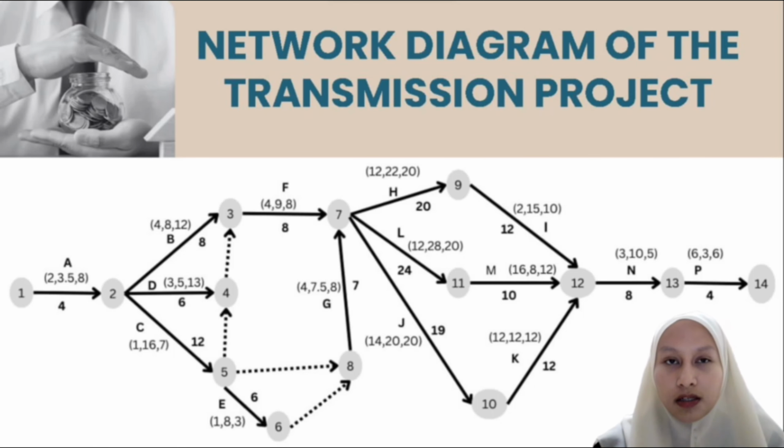The next is arrows, which show the relationships and interdependencies between nodes. They indicate the sequence in which activities must be completed. So by arranging and connecting different components, the graphic shows the event progressions and the critical path that controls the project duration. From here, the critical path is the sequence of nodes and arrows that represent the longest path through the network diagram. It determines the shortest possible duration of the project.